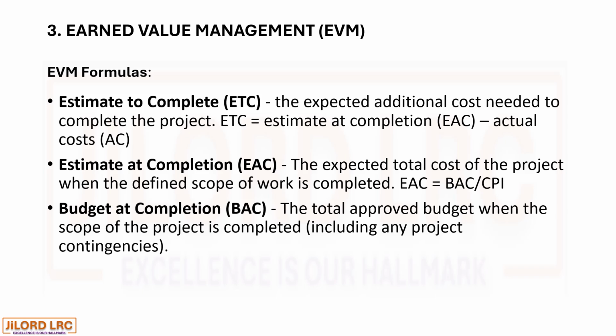And then we have budget at completion, BAC. The total approved budget when the scope of the project is completed, including any project contingencies.